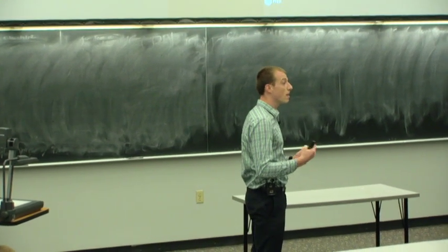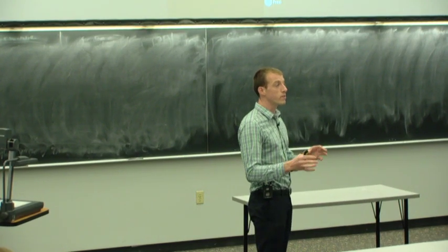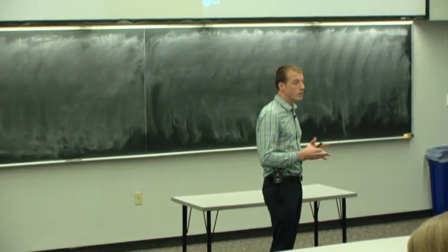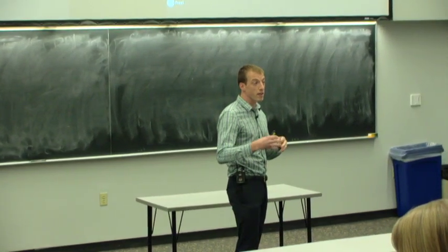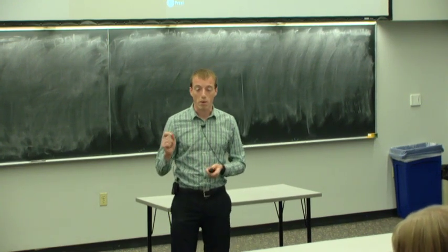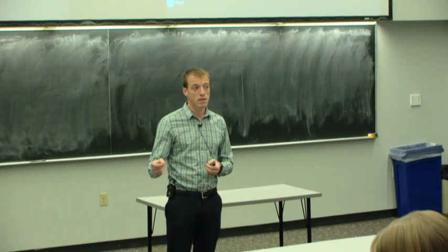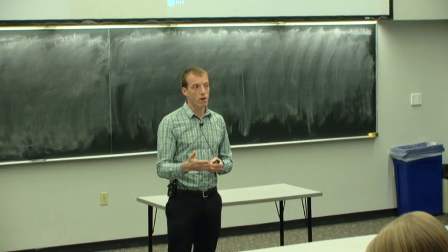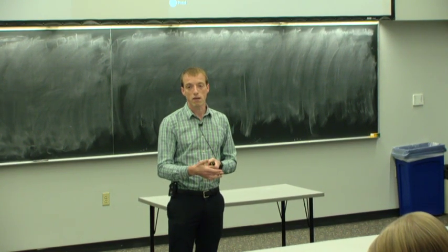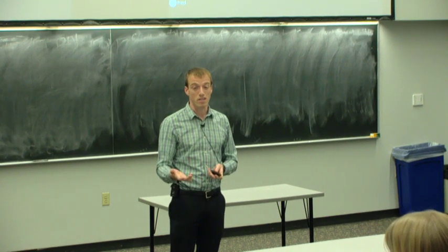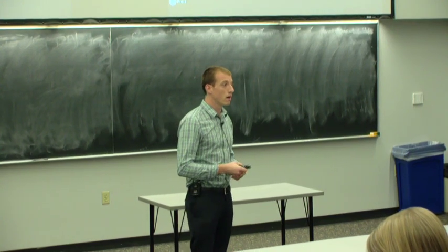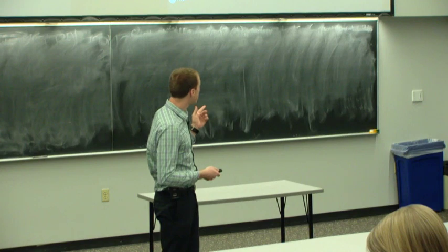So you have to put all these things in context of your project, in the context of use of your project, right? And then the last one is detection. So this is how likely are we to catch this before the effects actually happen, right? This especially comes into play with a process FMEA when we're making this. If we drill too deep in this hole, we'll break through the other side of the part, and that would be a failure. But we would see it right away, and we can throw that part away and make another one. That risk is low. If you wouldn't know it was there until it was in the field, and then it fails, that would be a negative for your project. So that's why the detection piece comes into play.